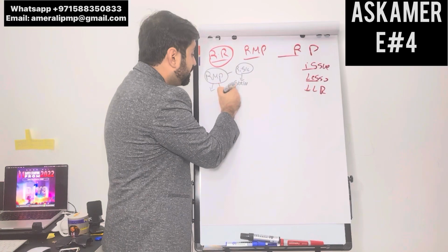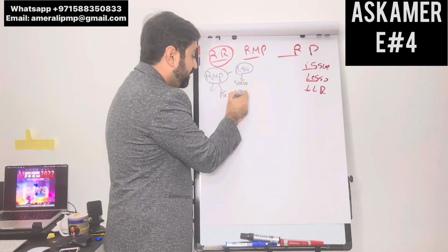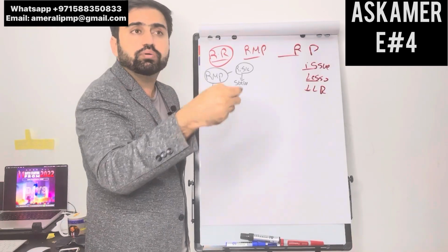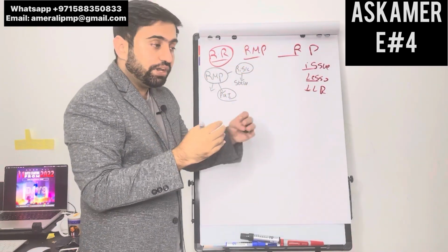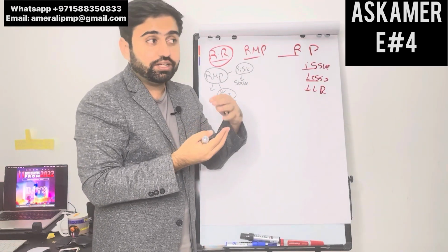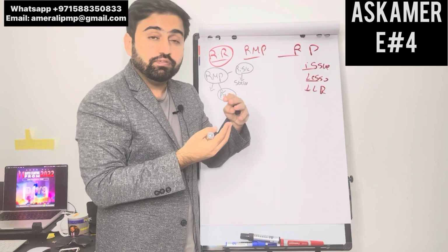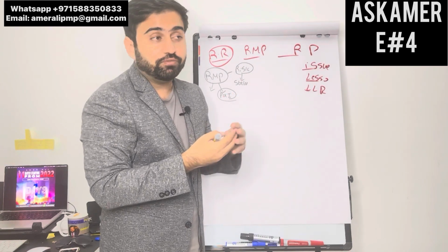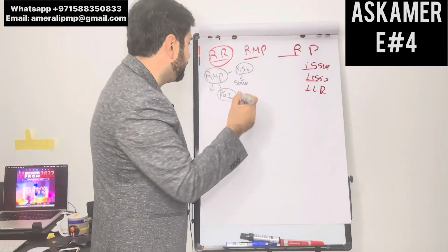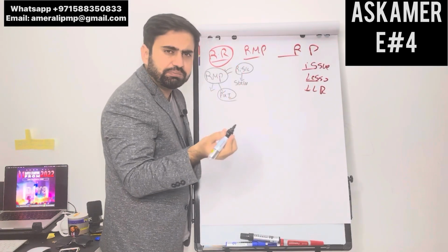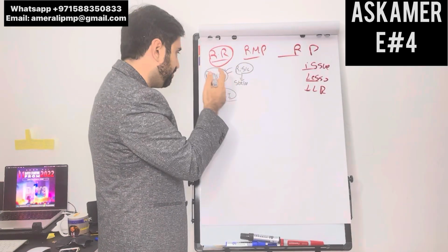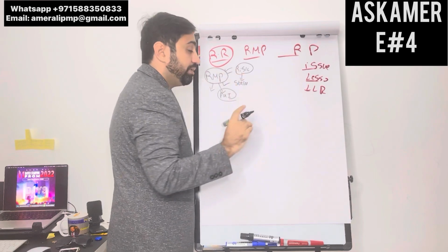It also gives us probability and impact definitions, and also gives us a method for how to communicate with the other stakeholders when a risk escalates above the threshold limit. If you have to escalate the risk, will you use the program way or the portfolio way? However you want to communicate to the other authorities, it will also be given in the risk management plan, and of course how you communicate also goes into the communication plan. So this is a risk management plan.